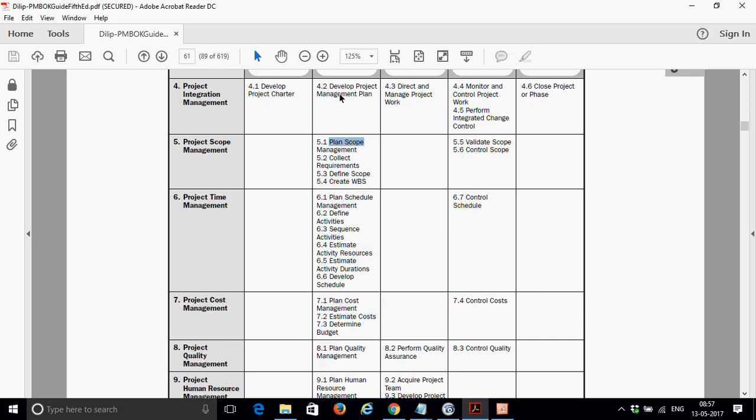As part of this project management plan, there are the schedule management plan, cost management plan, and quality management plan. Whatever documents you create in other knowledge areas are also input to develop project management plan. These documents are called subsidiary documents, related to scope or time, as part of the bigger picture of the project management plan.